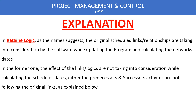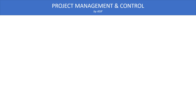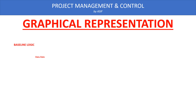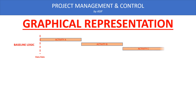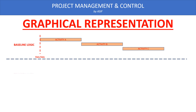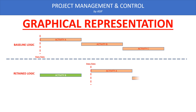To explain this through a graphical representation: suppose our baseline program has three activities — Activity A, Activity B, and Activity C — linked finish-to-start with each other. When we are updating the program and Activity B is completed, but Activity A is delayed, this delay in Activity A will carry through to Activity C via Activity B.